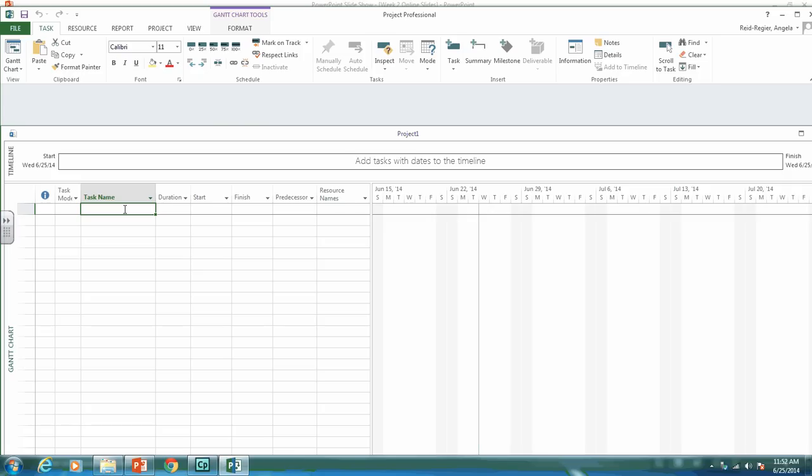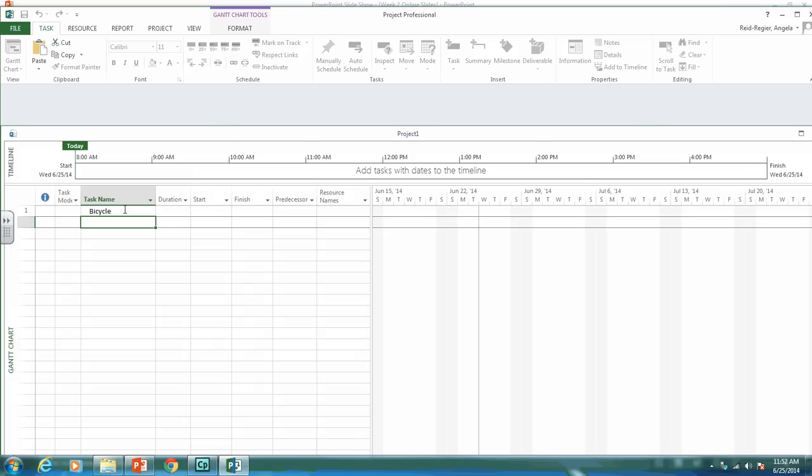And we will enter in all of our deliverables, sub-deliverables and work packages for the bicycle into Microsoft Project. So we just start typing. So the first thing we need to do is our project, which is the bicycle itself. Then we can put in one of our deliverables, which is the frame set.